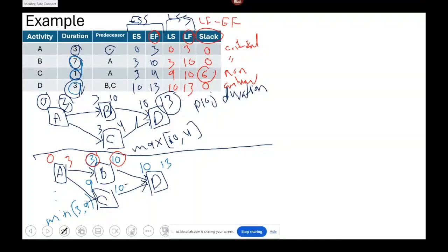Non-critical activities are the activities which have a spare time. If this activity is delayed for any reason, this will not cause a project delay as long as the duration of the slack is not exceeded. If it is exceeded, it will become critical again, since any delay after the slack will cause project delay.